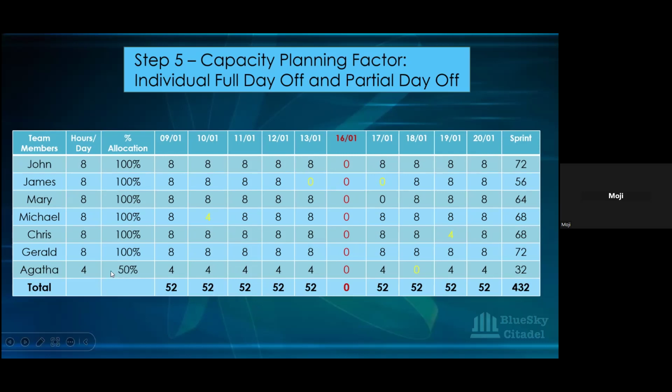The same goes for Gerard. If he was taking 2 days off or something like that, he might have had 56 here. So the formula stays. What gets affected is that you note the days they've taken, you deduct it from their total, and that definitely affects the total here. But I've just pinpointed a few ones. Do you understand? Just to drive the point home.